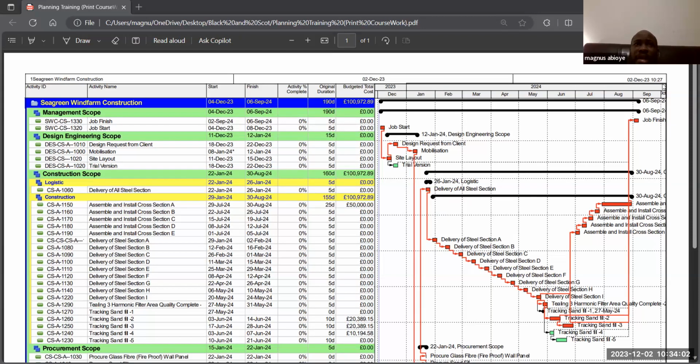It's just like the domino effect. Not the domino, that's not a good example, but generally when you dissolve an activity, you're also adding to that instruction of dissolving to link the predecessors of the activity you intend to dissolve and the successor of the activity you intend to dissolve, link it together.